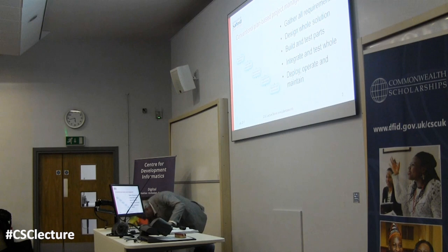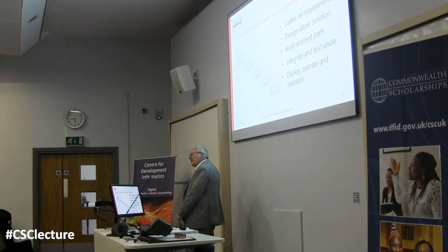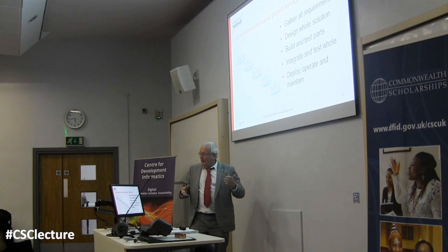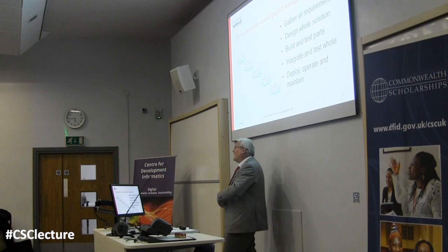So you're going to start building the thing. The idea here is you can't design something if you don't know what the requirements are, and you can't start building until you've done the design. There's a sequence built into this process. And then we might say we're going to take all the pieces and put them together, integrate all of the moving parts, and then we can start testing it all together, and then we can deploy it. And the idea is at that point we have a fantastic handover and everybody's pleased and delighted.